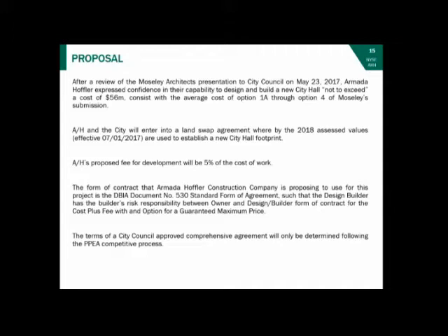And the fee that they have listed here at 5%, you should be aware of all the other phases of Town Center were constructed on a 6% fee. And so when they asked us about this, we said, look, in order for us to even give this great consideration, let's try and get this thing down lower. And so they dropped it 1% from what we have done in all our other phases of Town Center.